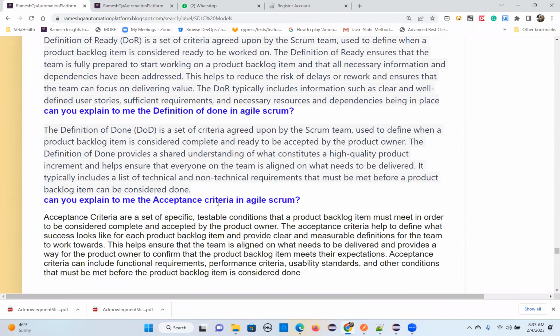He met all the acceptance criteria points. He finished all the acceptance criteria points in his user story in the development. He has to show that while demoing. Each point, whether he covered it or not, he will show on demo day. That is what acceptance criteria means. So what are the important points to complete that user story?